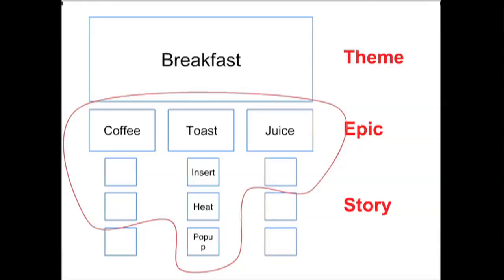Just one other thing to add is about how we actually, on my teams, break down the stories. So everything is in the context of the product vision. So what is the vision we're trying to achieve? And then we start making user stories. Now, a lot of times these user stories are quite large. As we saw in the previous example, they're massive. It might be something that could encompass 10 people for 3 months to do. But that's okay. We actually want that because by taking the bigger picture, we can break it down to get to the detailed level and user stories that we can complete within a sprint.